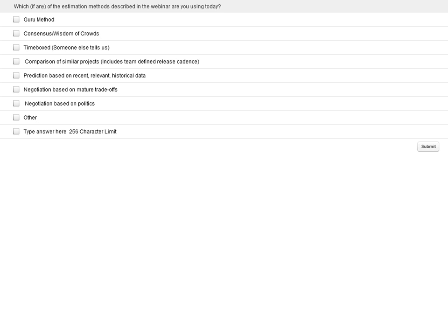So are you doing the guru method? Are you using the consensus method? Does someone just give you it should be, we need this tested by noon? Do we actually have comparison to similar projects? And I'm going to include with that, we release every 2 weeks, and it takes us about 3 days. We start testing Friday. We release on Monday. We know how long a sprint takes compared to other sprints. That'd be comparison. Are we doing prediction? Are we negotiating politically, or are we doing it based on realistic trade-offs?